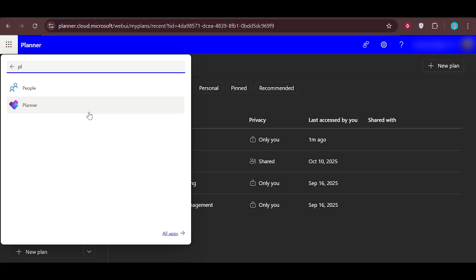Once you've imported your XML file into the Power App, the data is transformed into a format that Microsoft 365 understands as a project-style plan. This can include tasks, start and finish dates, dependencies, and other metadata your XML file contained. At this stage, don't worry if it doesn't look like Planner yet. You're still in the Power App view, which is more data-centric and sometimes more technical.